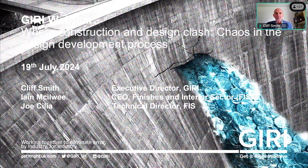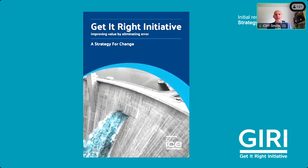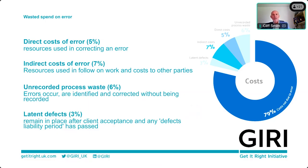In 2015 we carried out a research project looking to establish what is the root cause of error and how much we waste as an industry. We had contributions from many organisations who were willing to share their information. The chart shows the cumulative wasted spend on error is 21% of turnover: 5% direct costs, which we all see with NCRs and tablets.